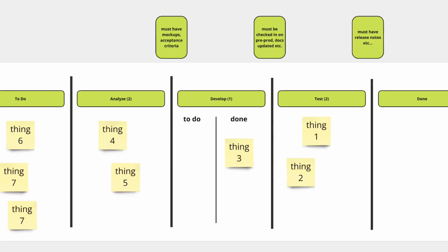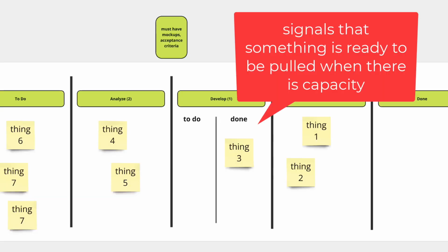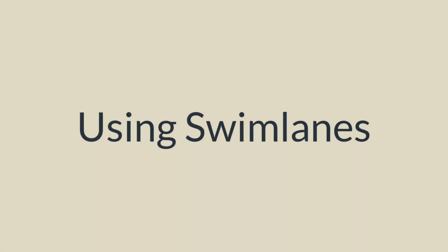So what you would do is in your workflow state, you would take your card, you would pull it into a done column or a waiting column, and that signals the downstream process that there's another chunk of work that's ready to be done. And you can just simply track how many days, hours, whatever that card has been sitting in that buffer state, and your CFD diagram is going to help you understand where things are getting stuck. So you can use a buffer process just for visualization. Ideally, you want that to go away and you want your process to be smoothed out as much as possible.